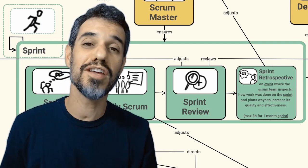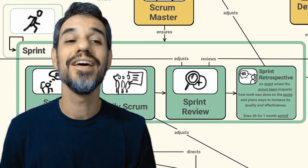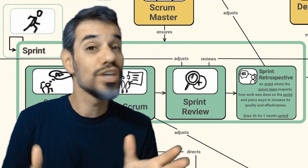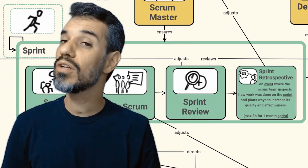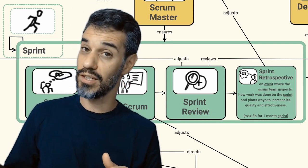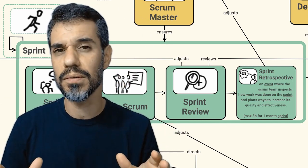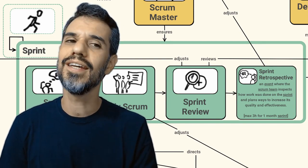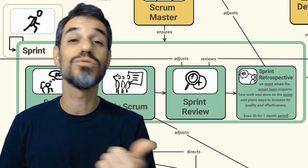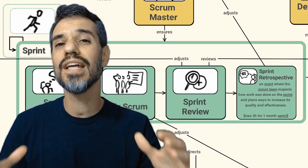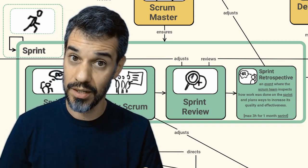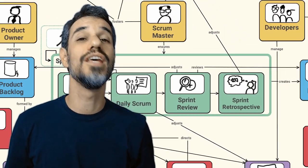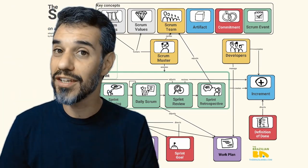And the last event on Scrum is the sprint retrospective. This is the event that concludes a sprint. It's an event not for stakeholders outside of the Scrum team. It's just for the Scrum team and the inspection is not going to be made in the increment or the results of the Scrum, but in the way that the work is being done. The sprint retrospective may adjust how the team is working in the Scrum.